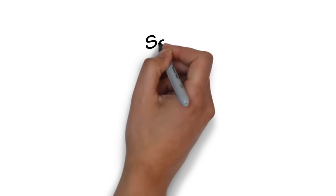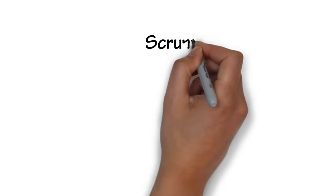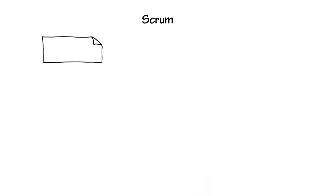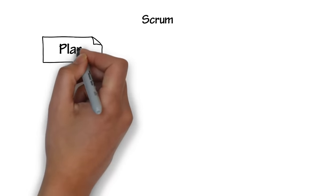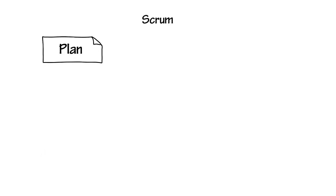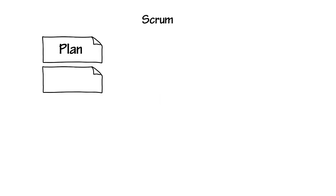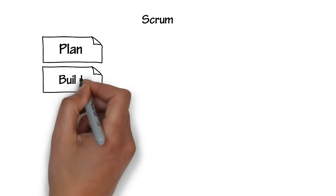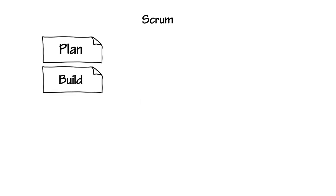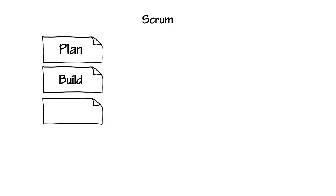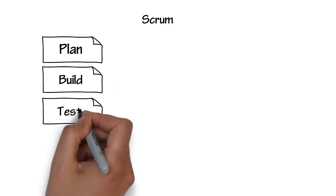With Scrum and implementation of Agile, the process is broken up into smaller pieces. First, we do just enough planning to get started with building the minimal feature set. We build what was planned. Next, we test and review that small feature set and get it ready to ship.